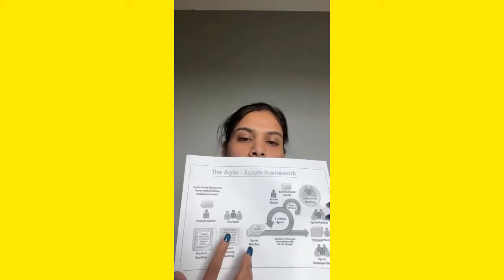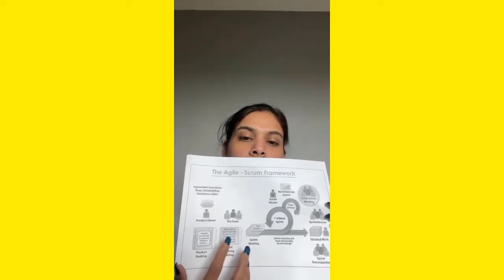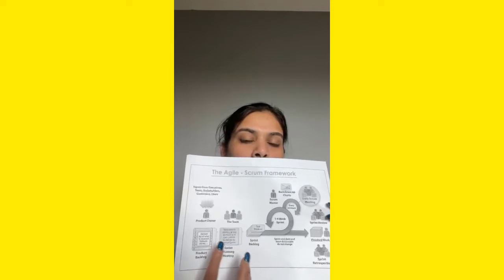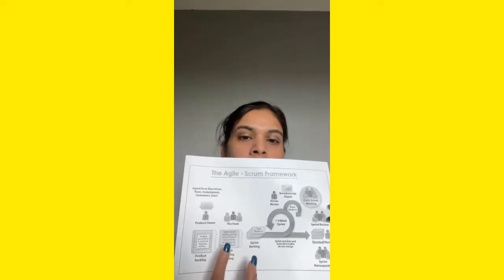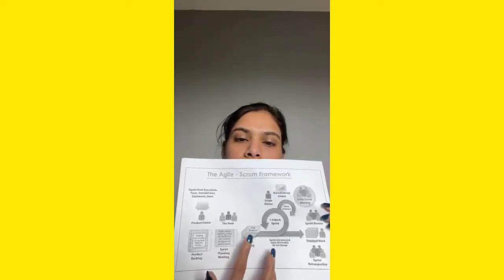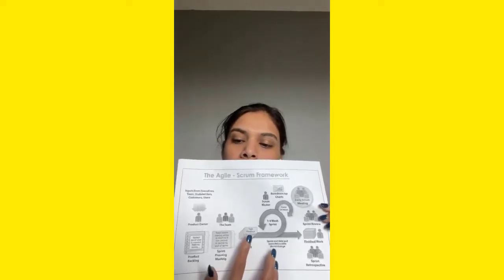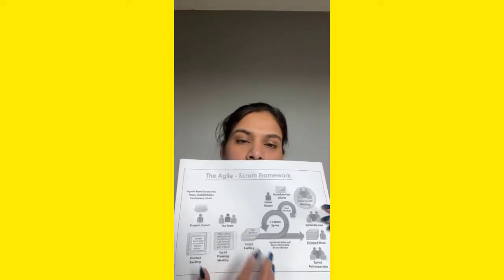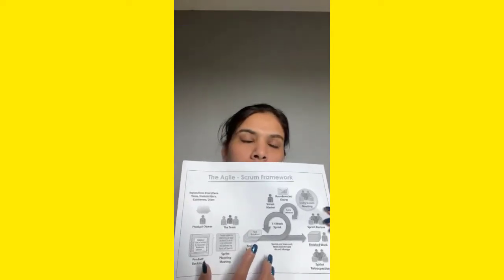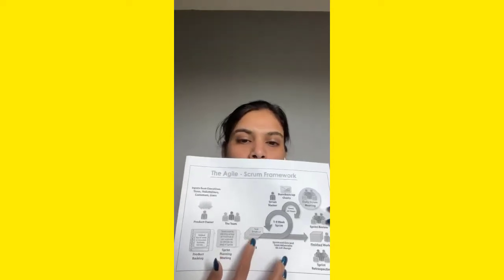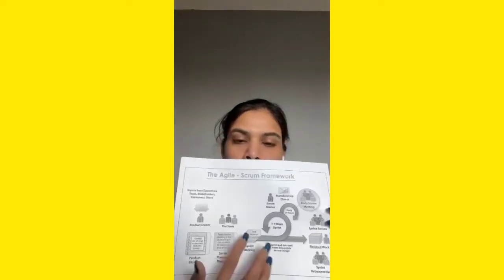Usually a sprint is the time box or the duration of the task carried out, which is around 2 to 4 weeks. Then the tasks are further broken down in the sprint backlog, and in the sprint backlog, the development team lists out the work that needs to be carried out, and it is further broken down.